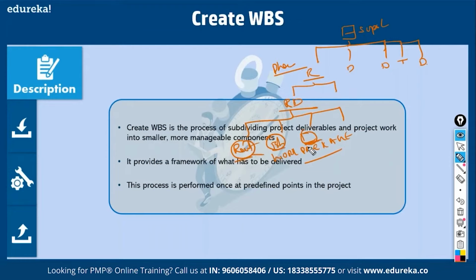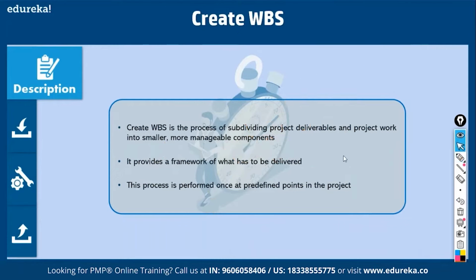Now you call the team and tell them, guys, start working. They'll start working in a very feverish way. Okay, my requirement documentation is Reuters, is it? You address this to John. John will say, well, these are all the processes I must do. Number one, I have to do a bit of research. Number two, I have to collect requirements. Number three, I have to document requirements. Number four, I have to get a sign off. So like this, you split a work package into activities and plan how to deliver it. This is called create WBS. This is a very important step in the scope definition process.